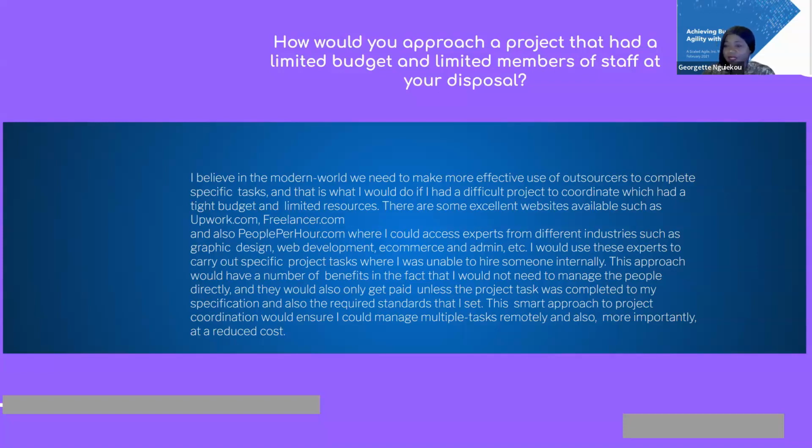So even if the staff is limited, they have to be cross-functional. They have to be able to deliver incrementally without seeking somebody from outside the team. So those are the 2 criteria that you always make sure that you have in your team before you start a project. Otherwise, that project will fail.